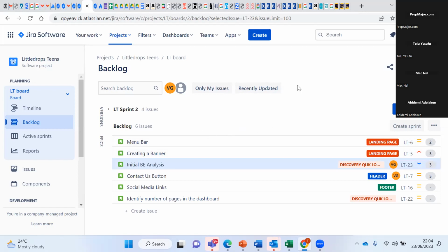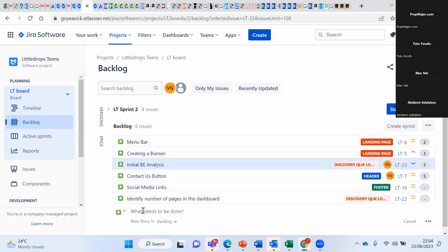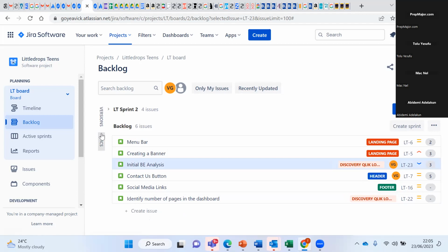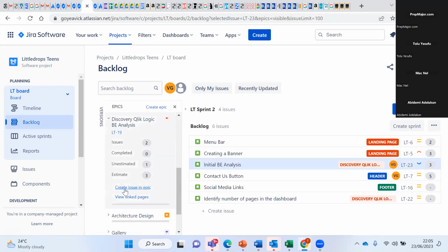If you want to create, what's it called now? Let's create a bug. So I want to create a bug, and I click on create issue. It's the same process. The only thing is what I'm creating now is a bug. So I need to change that view to bug. And then I can put the title of the bug in there. But again, you would then need to link that bug to whatever epic you're creating that bug for. Otherwise, alternatively, just go through the same process where you create your issue within your epic.